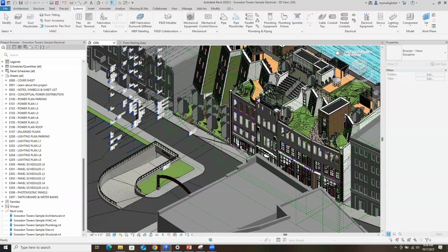So what is LOD 100, LOD 200, LOD 300, LOD 400? Those standards are being defined. Then there will be a certain coordination point to which all the disciplines are connected. The origin of the coordinate is decided, and that is mentioned in the BEP, the BIM execution plan.